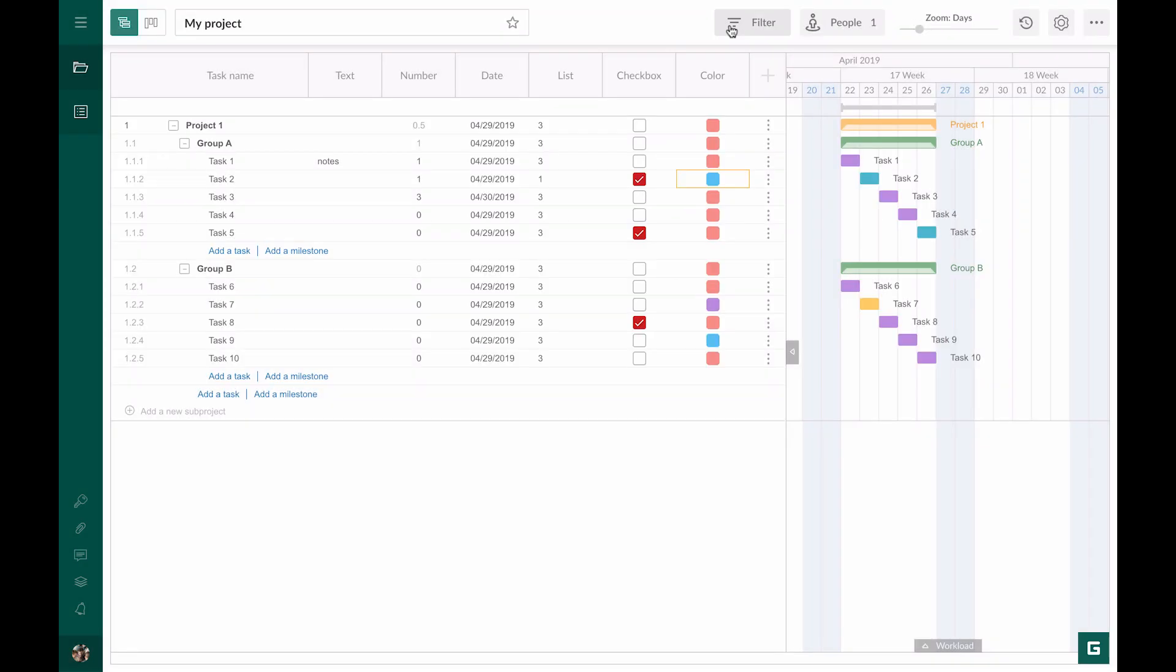Gantt Pro does not allow changing the type of column. However, team members can personalize their projects, choose what columns to show, change the way they look, etc. Note, if you as a project manager have added a new column, it won't appear automatically for every team member of your project. They have to activate it in their project.